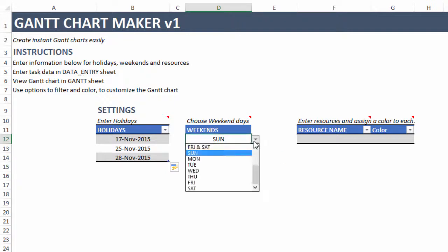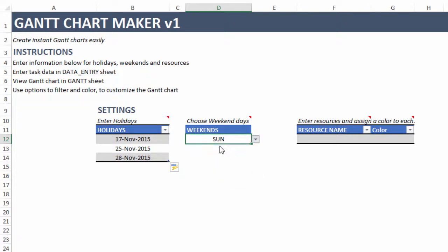For weekends, you can choose Sunday only or various other options. I'm going to choose Saturday and Sunday, which means every Saturday and Sunday will count as a non-working day. When the template calculates the end date of your task it will exclude these days. You can customize your weekend days very easily in the Gantt chart.